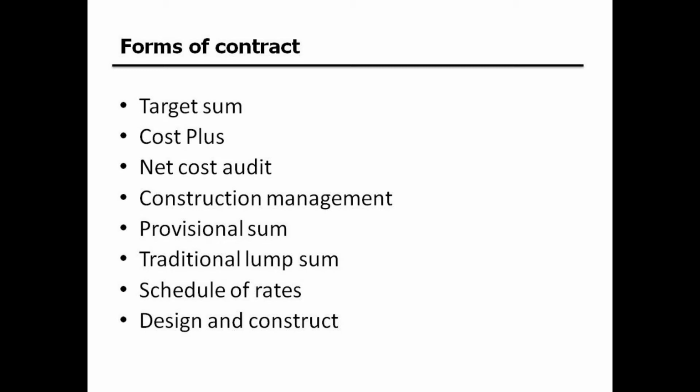So it is, I must say, useful on very unusual projects or one-offs. It's quite difficult to cost monitor, and often it can be difficult agreeing and pricing variations, particularly when you consider the original scope. That's where the contractor is paid the cost of the materials and resources plus an agreed percentage.